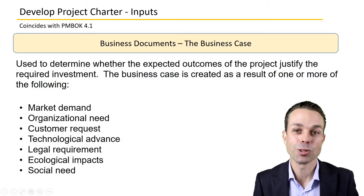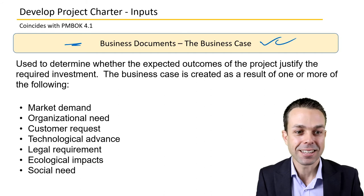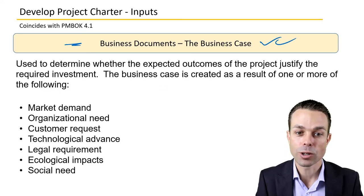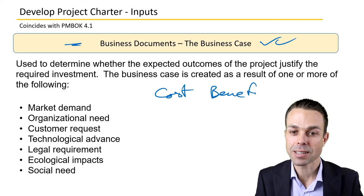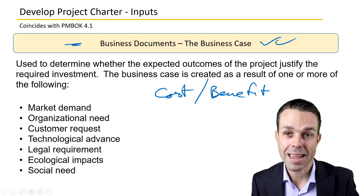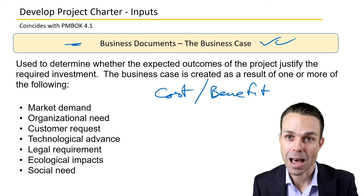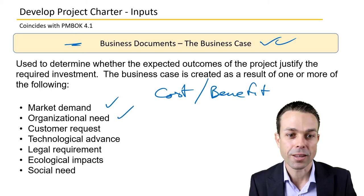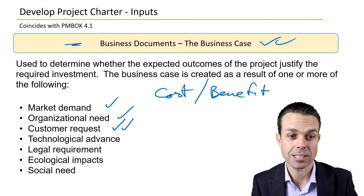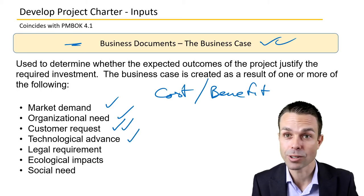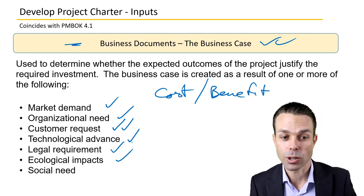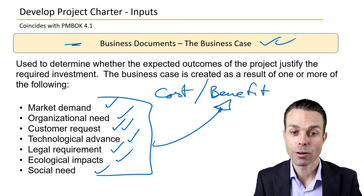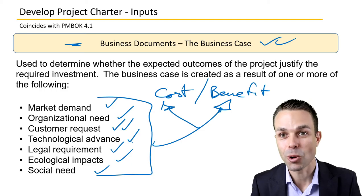Let's look at the inputs to develop project charter. We've got the business documents — the business case. This is used to determine the expected outcomes of the project and justify the required investment: what is the cost and what is the benefit? The project manager may need to work with the sponsor on this. We're looking at things like market demand, organizational need, customer requests, technological advances, legal requirements, ecological impacts, or social need. All of these might be associated with the benefits, but we also have to assess whether it's worthwhile to do.